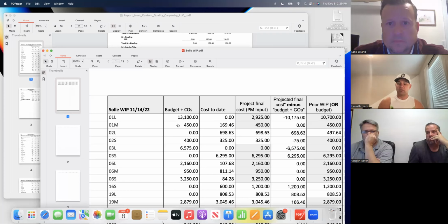And so they call ABC Plumbing and give them the scope, give them the plans, spend 10 minutes on the phone with them, or meet them at the job site, however they want to handle it, and say, look, this is what I have in the budget. They already know what it's sold to the client for. And they say, this is what we have in the budget. Do you want this job, can you do this job, or will it fit in your schedule? And you do that across multiple trades, also across materials too.